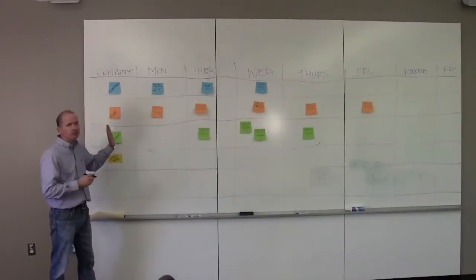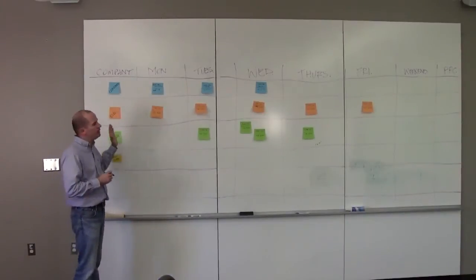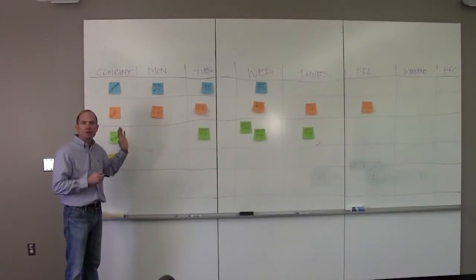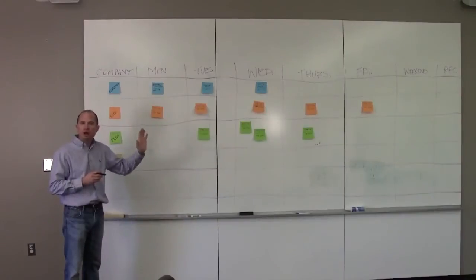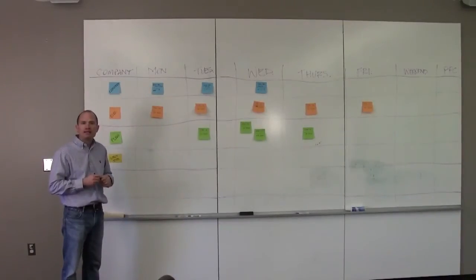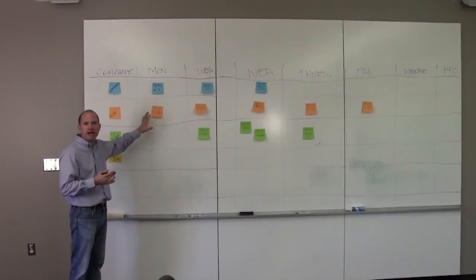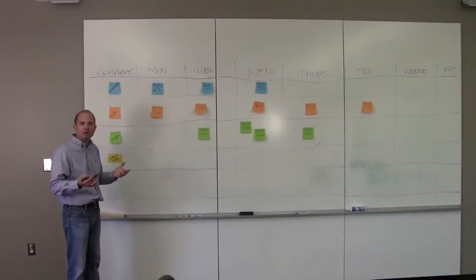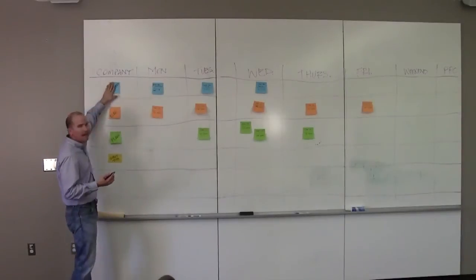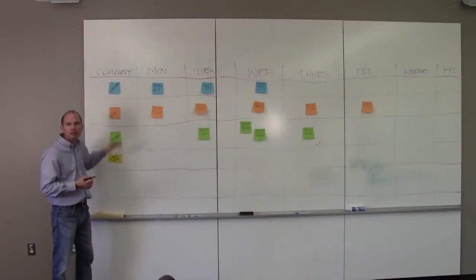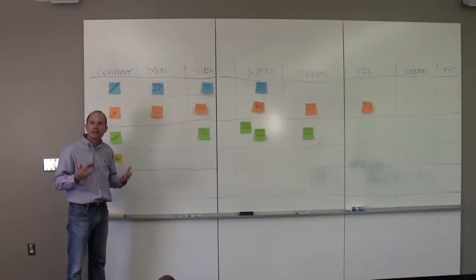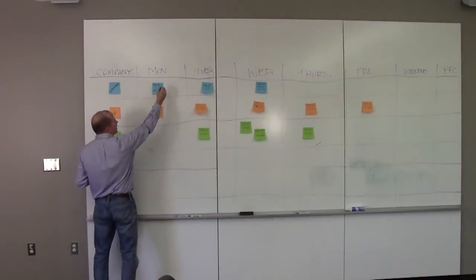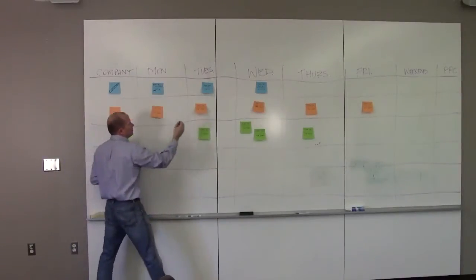So you've got your task and you can meet each day or you can meet at the end of the week to talk about what you got done. But my suggestion is to use this board to track that. So the trade partner or the consultant, the person who scheduled their task, they would come in and when they think they have done their task, they would put one strike through that task.